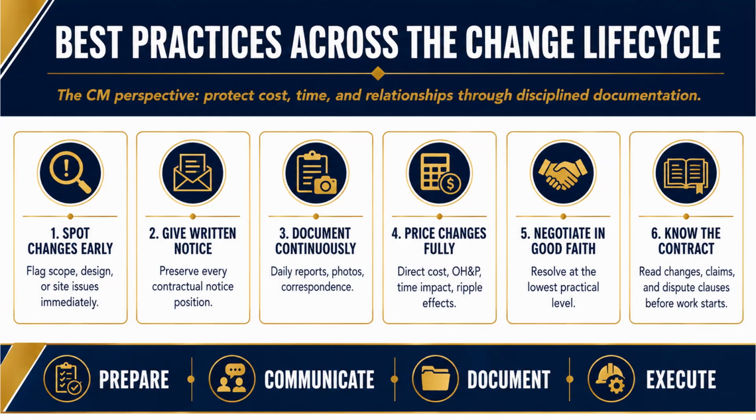6. Know the contract. Read the changes, claims, and dispute clauses before work starts, not when you have a problem. You should know your notice deadlines, your markup caps, and your dispute path on day 1, not discover them in a crisis. And it all comes down to 4 verbs. Prepare, communicate, document, execute. That's the rhythm of professional change management. Prepare before it happens, communicate clearly when it does, document everything throughout, and execute the resolution cleanly.